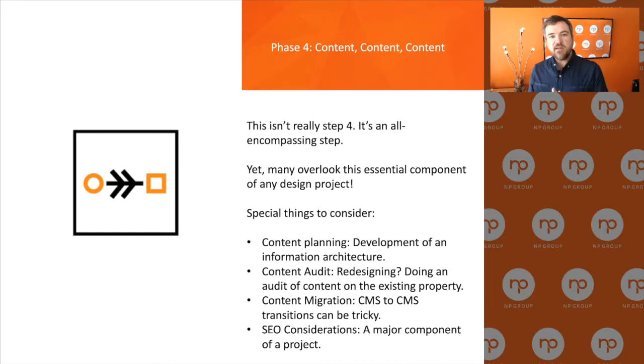If you're redesigning from an old site to a new, do a content audit. Find out exactly what you have. I mean, do you have 1,000 pages? Do you have 200? You're going to need to understand what you have, how it's going to live within the new navigation. And also, are you going to have to redirect some things? Or are some things going to change locations? So the content audit is important. I personally like going into Excel, putting an old URL, putting a new URL, and using that to manage the process. Migration, very often overlooked, very often.